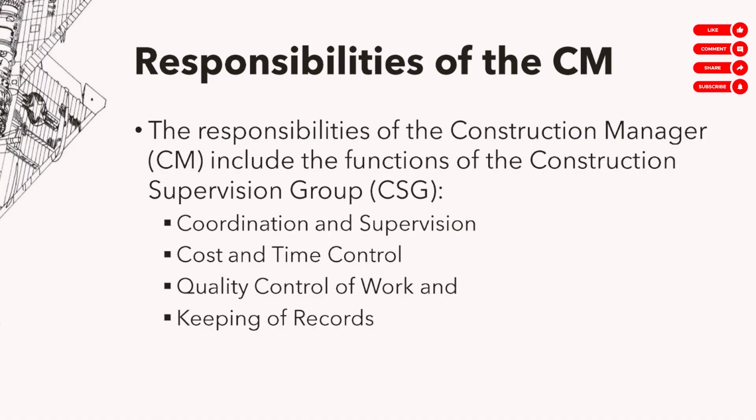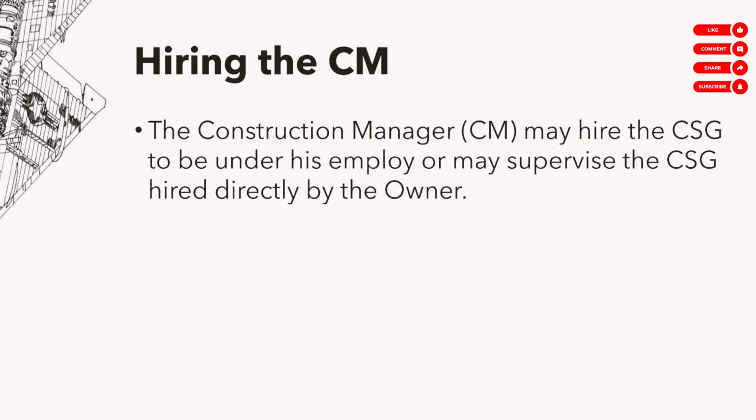This is really, I wouldn't say project management, but yeah, construction management. Now, you're worried about the budget, you're trying to check the schedule consistently, trying to find ways to meet the deadline and not go beyond the budget. So, obviously, your responsibilities are bigger here, okay, compared to kanina yung full-time supervision service. Okay? Now, yung CM, depende sa setup, pwede raw siya na yung magdala ng inspectors niya, or pwede naman na si owner mag-hire ng inspectors, mag-hire ng CM. Pero in any case, yung mga full-time inspectors kanina, nag-report yan dapat sa CM, kung merong CM.